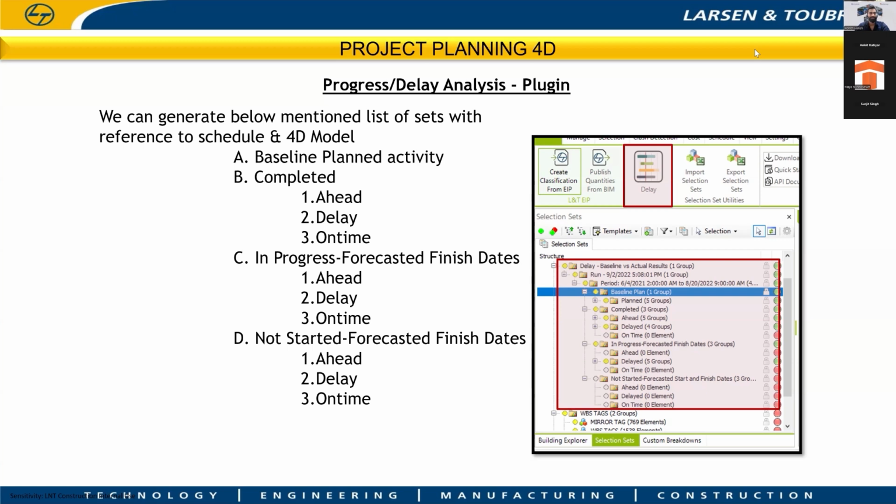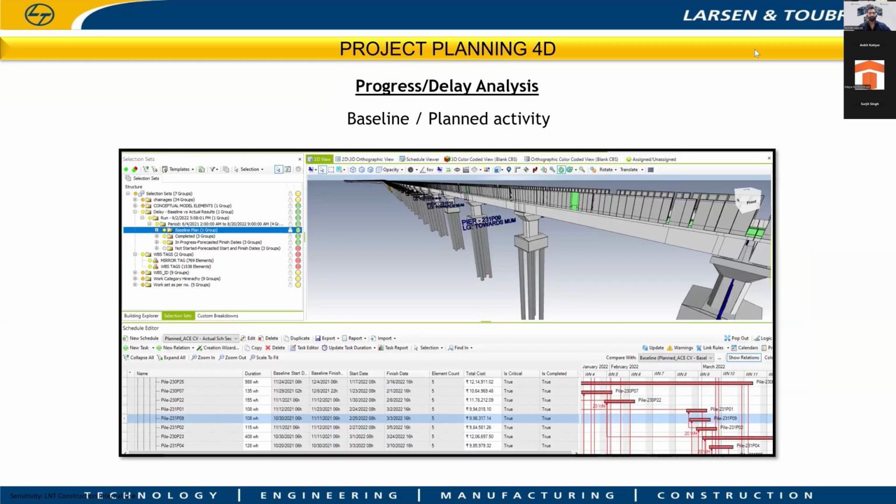Great. Thank you. So coming back to the slide again, we used to track the in progress activity. It goes into detail on whether you are ahead or delayed on time, even though it is in progress. For not started activities, it shows what is supposed to have started, which could be ahead of when it was constructed on site. It could be delayed or on time.